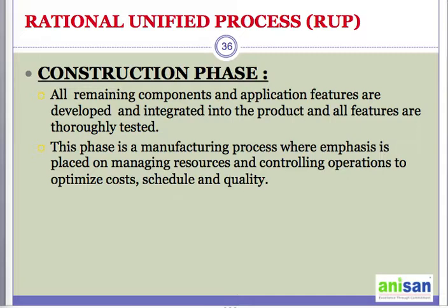They asked at what stage you need to plan for the operating model. You definitely need to plan it the moment you finish the architectural diagram, because the architectural diagram tells you what components there are.